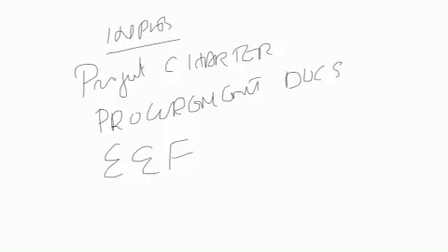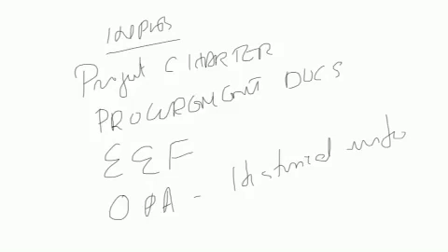Then the organizational process assets like historical data, historical information about the past projects, lessons learned from past projects, the vendor rating systems, the risk management data from past projects. So all these things will be useful while identifying the stakeholder.